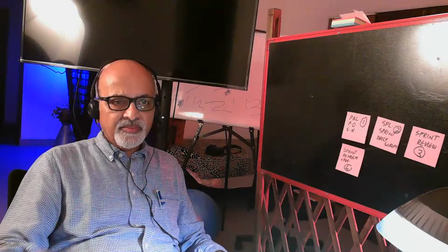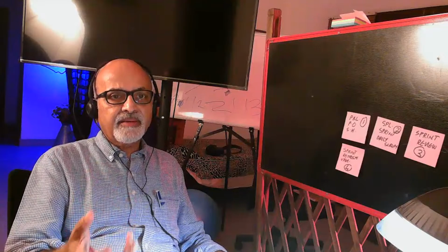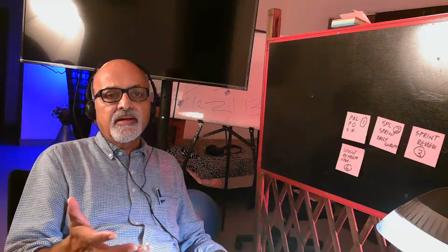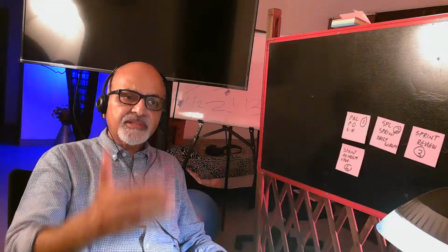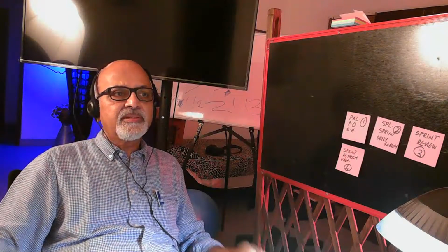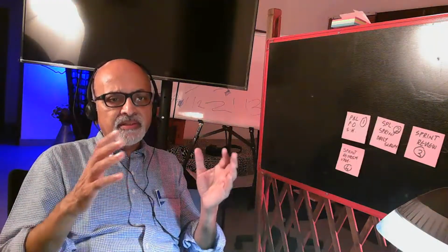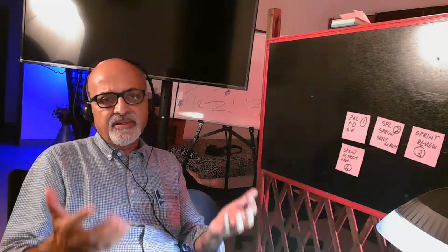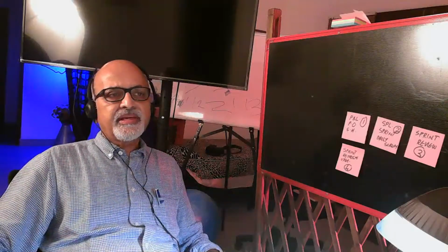like what did I do yesterday, what am I doing today, and what are the challenges I am facing, and where all I need help. This he or she says to the rest of the team. So these things are not told to the Scrum Master nor the product owner. The daily Scrum meeting is the team's meeting. So they just share the status of the work with the rest of the team.